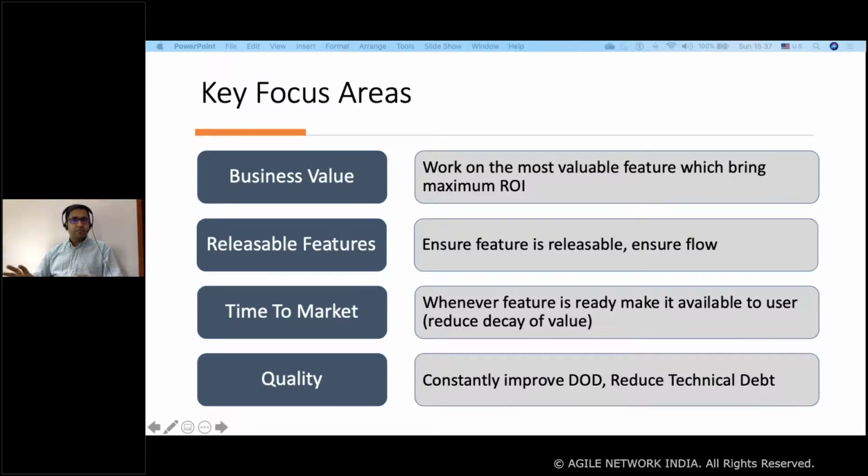The organization was working in traditional waterfall; there was a business organization and a technology organization, working in silos. The first and foremost thing was to break the silos and bring business and technology together. Each organization might have its own strategy to do it, but one of the things they did was to have product owners from the business, working directly with the team, with no mediators.